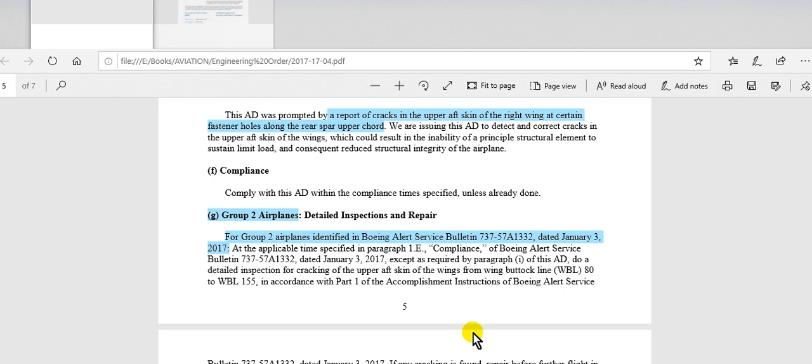Now you have finished the engineering order items. Take care — the planning engineer should not put the engineering order in the work package until confirming that the materials and special tools are in the store. Also take care that the man hours are available for this check. If it is a small check like an A-check or weekly check, there may not be enough man hours or elapsed time, and the aircraft could be grounded. Take care from that.